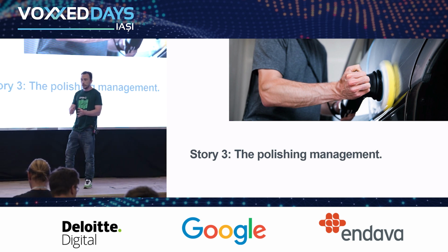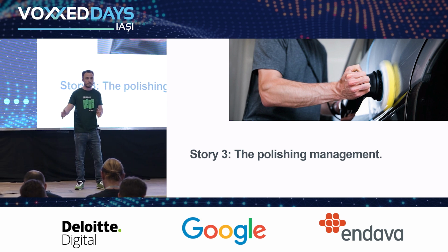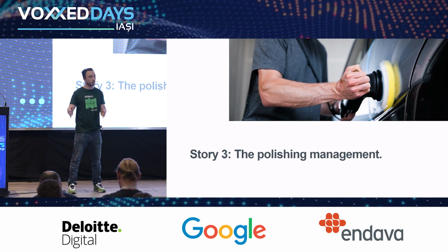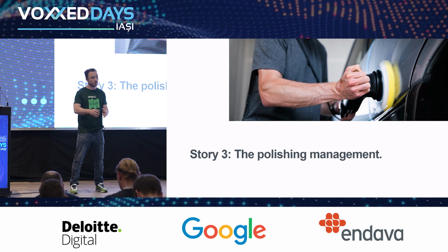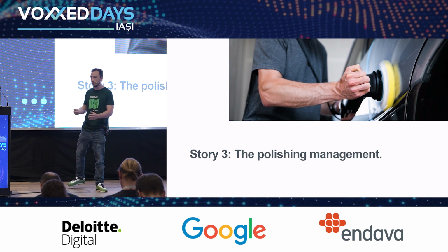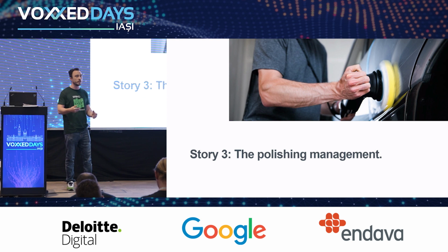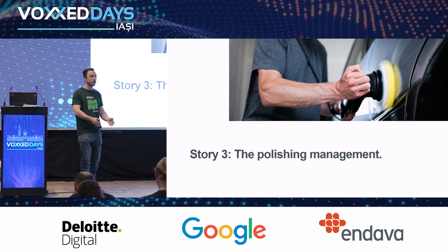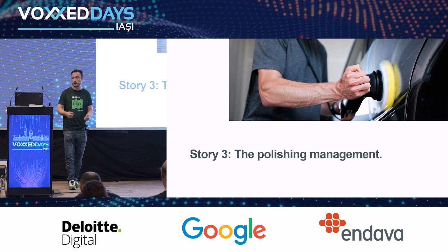So if you try to take a story and polish it, there are good chances that you will not be able to reach the same quality you would like, even if you allowed a lot of time to polish it, rather than applying the Boy Scout rule, meaning leave things the way you understand them now, the things you think are clean enough now. Then next sprint, or some weeks after, you might revisit that code, and you might observe something that looks like it could be enhanced, and then you follow the Boy Scout rule and change it on the spot, or if it's something larger that you can't do that, you put it in the backlog as we discussed earlier. That's how we should apply things.